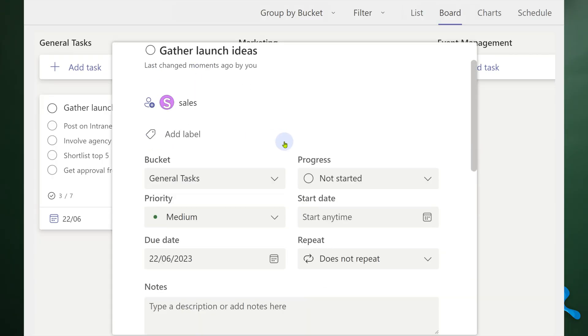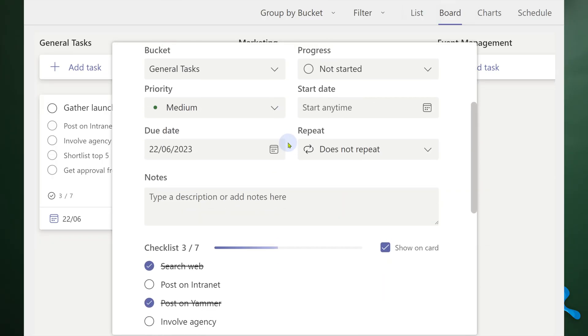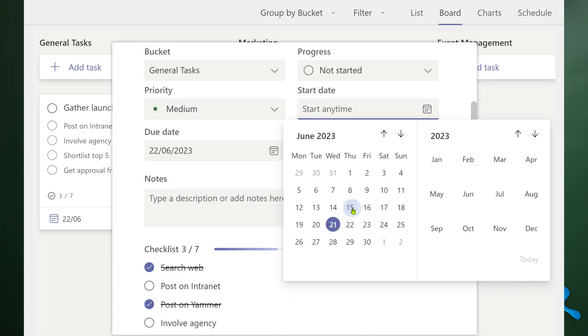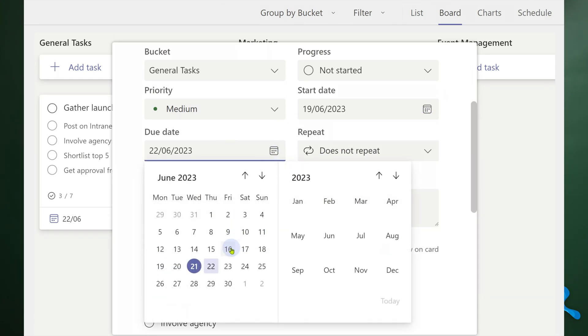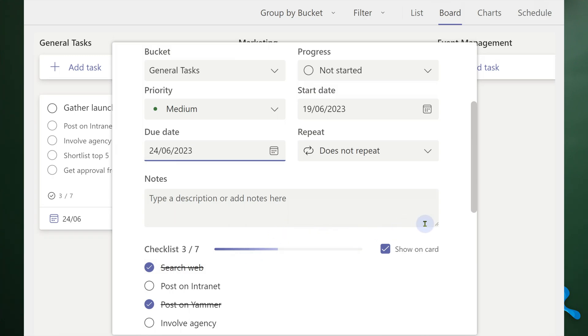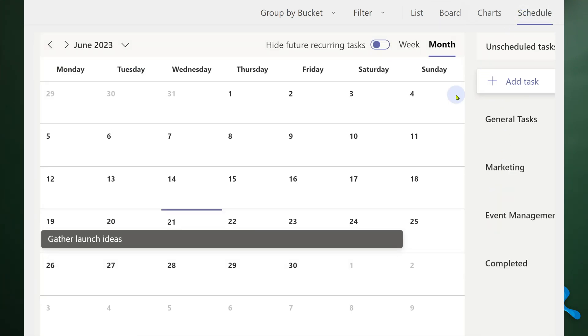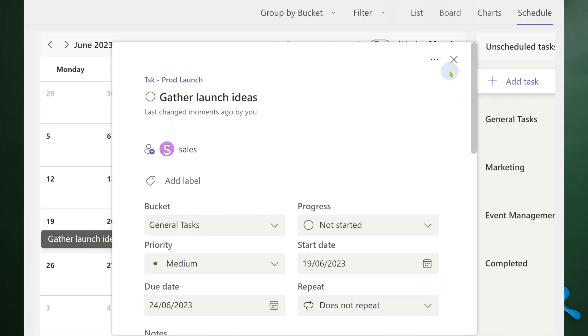By default we put the due date, but if you have a duration, you can also put a start date. When you have a start date and an end date, there is a view called Schedule View which shows you the duration of the task in a calendar — like a mini Gantt chart.